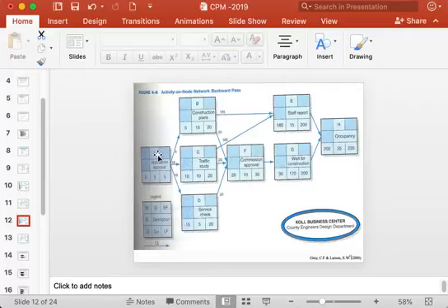And again similarly for activity A, B, C and D are following, so when you take the latest finish time here, from among them you have to take the smallest one. You can see B has 5, C has 10 and D has 15, so you cannot put 10 here or 15 here, you have to put 5 here, which is the smallest among the three.